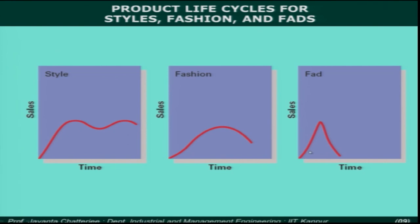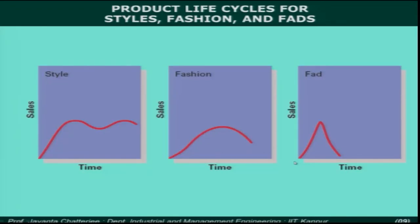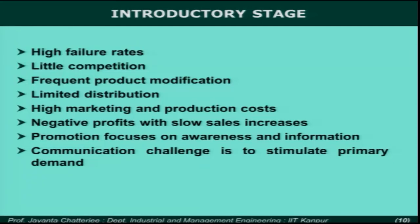Even high-technology products like semiconductors almost follow the same fad-like life cycle. Semiconductor products are introduced, very rapidly accepted, and then replaced by the next generation. The life of a semiconductor chip today is something like 6 to 8 months or maybe a year, even though it takes maybe 3 years of R&D to produce the next generation of chips. That means by the time you finish one development, that requirement may already be gone. That is why in high technology today you may have 3, 4, or 5 parallel development projects running side by side.